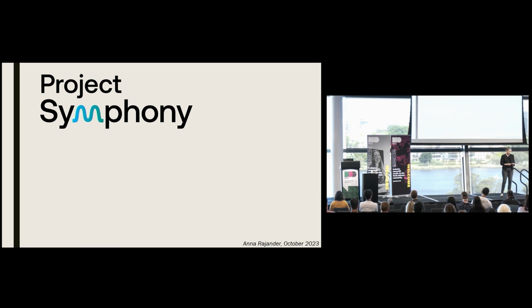As the project was working using an agile method, we broke down all the waterfall tasks required to get council approval for the battery into user stories and dutifully assigned them to sprints. We also broke down all the tasks required to install the battery, as well as all the IT tasks required to integrate the battery into the virtual power plant, and put them on the backlog so they were ready for when we got our council approval. But inevitably, there were delays.